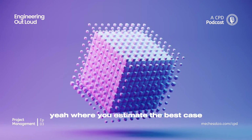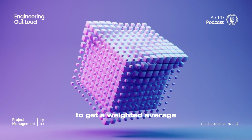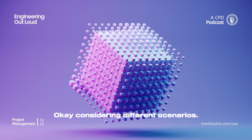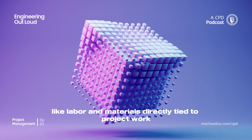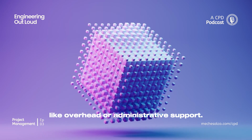Yeah, where you estimate the best case, worst case, and most likely cost, and then use a formula to get a weighted average. Gives you a more realistic range. Okay, considering different scenarios. Right. And you'll typically categorize costs into direct costs, like labor and materials directly tied to project work, and indirect costs, like overhead or administrative support.